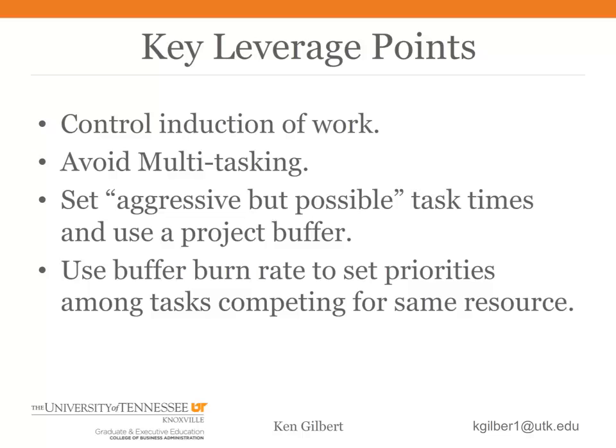Second, since there are so many projects in the system, individuals tend to multitask, or to work a little bit on one task and then a little bit on another one. Often this is dictated by what equipment might be available at a given time. CCPM says do not multitask. Do not begin working on a task until you have everything you need to work it to completion.